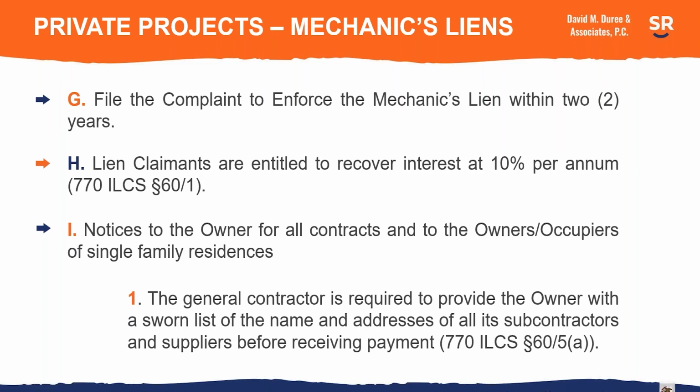And there's also a provision for single-family residences: the general contractor is obligated to give notice to the owner or occupier of the single-family residence that he's obligated to provide a list of all suppliers and subcontractors, and it is also obligated to provide a sworn list of all the names and addresses of the subcontractors.